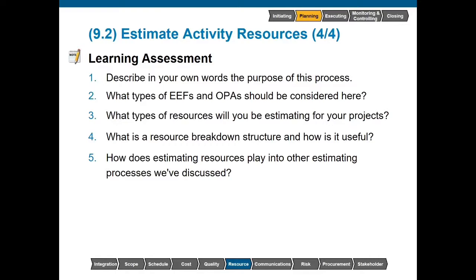What types of resources will you be estimating for your projects? All types of resources, anything that we need, including personnel, equipment, supplies, materials, anything we need to complete the work. What is a resource breakdown structure and how is it useful? A resource breakdown structure shows you resources need by type. It's very similar to a work breakdown structure in concept.